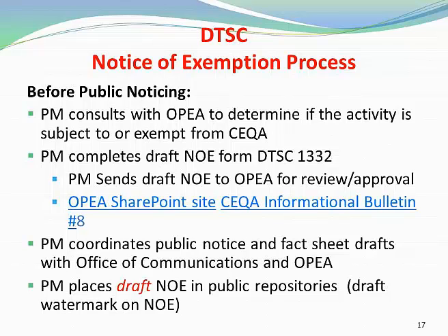Our review length is a minimum of 15 working days, and during this time, our staff checks the NOE for consistency with CEQA, the guidelines, DTSC policies and procedures and guidance, and verifies the analysis and findings. We will also review your DTSC decision document, be it a RAP, RAW, permit, etc., at the same time and compare the project description with what's described in the exemption draft. OPIA may also consult with OLC and affected agencies, and will decide if the public notice date can be met.